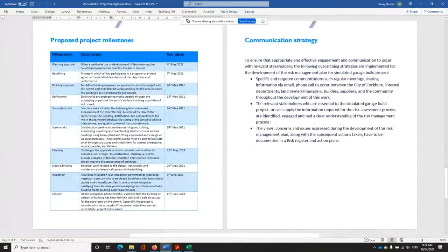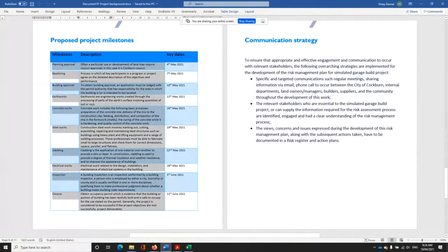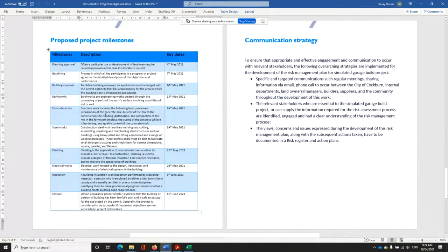But more importantly, I gave you some milestones. That's where your summaries are sitting. Those works should be performed. But again, they are baselines. I gave you a baseline. If you want to start on the 5th of May, it's up to you. But if I'm saying the gap between one activity and another should be 5 business days, keep those 5 business days. If you want to go for 6, that's not what I want.